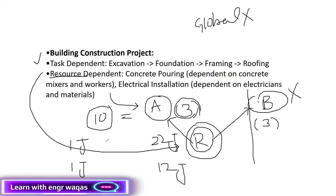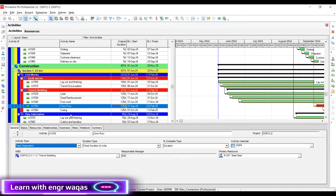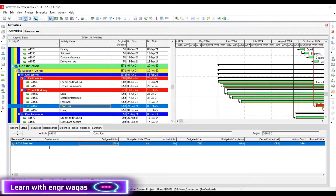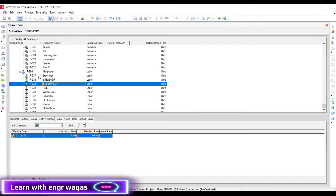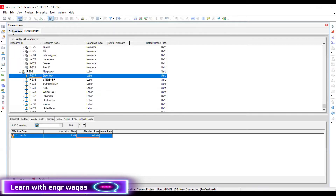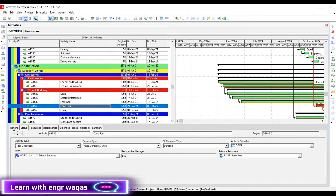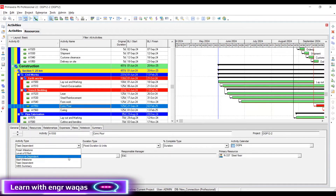I will help you understand how to develop resource dependent activities. Let's say this is a curing activity with a single resource — a steel fixer. The steel fixer is not available on my project all the time. First of all, I have to go to the activity type and make it resource dependent. That is the first step to convert any task dependent activity into a resource dependent one: go to the activity type and make it resource dependent.